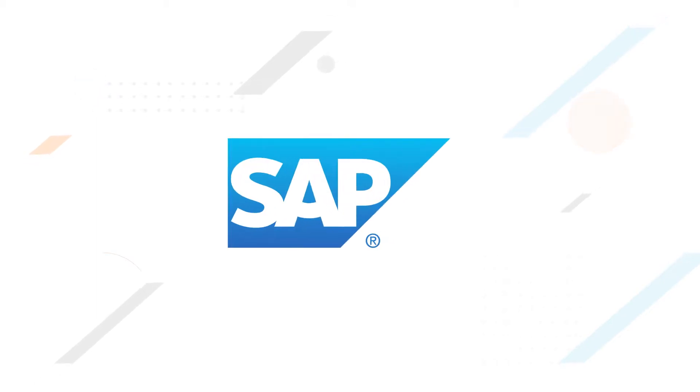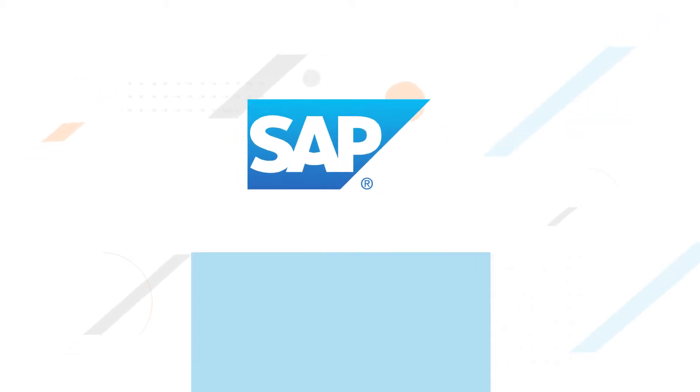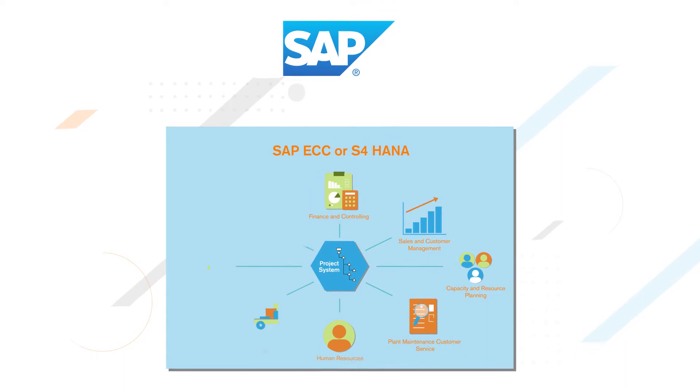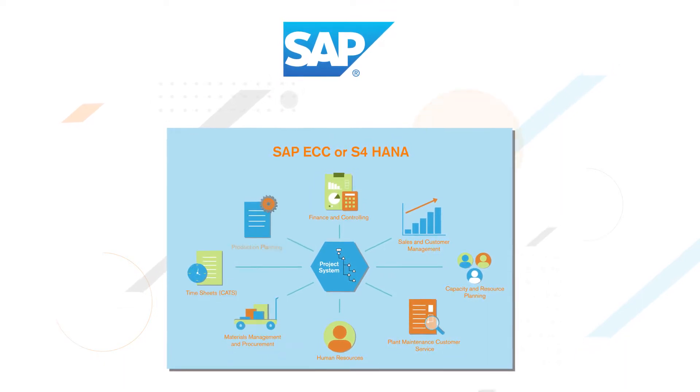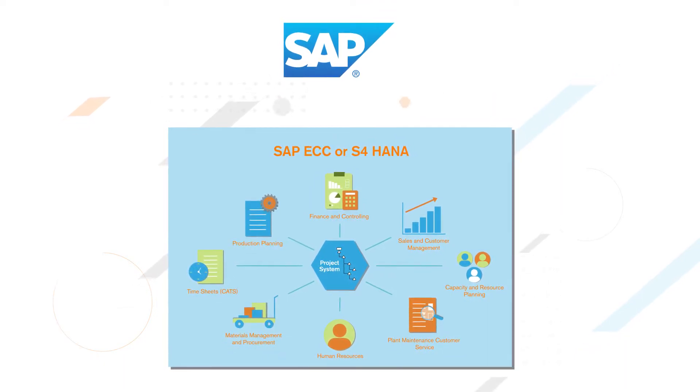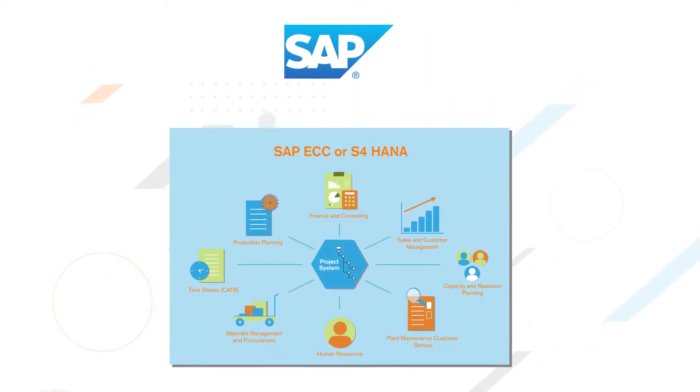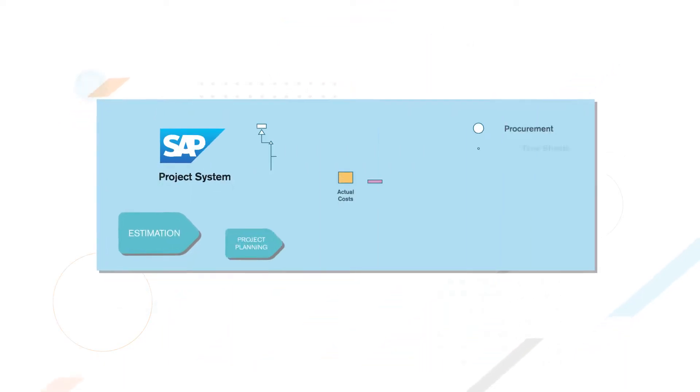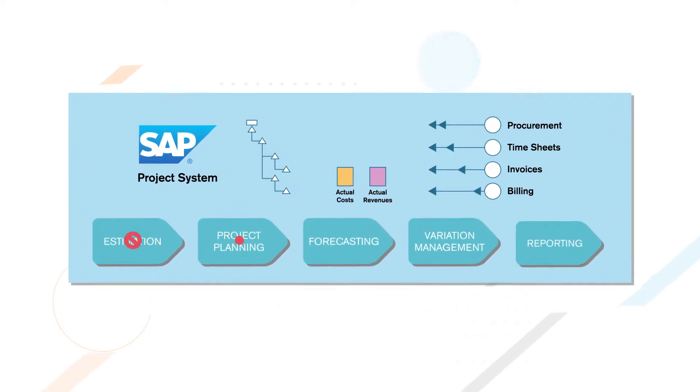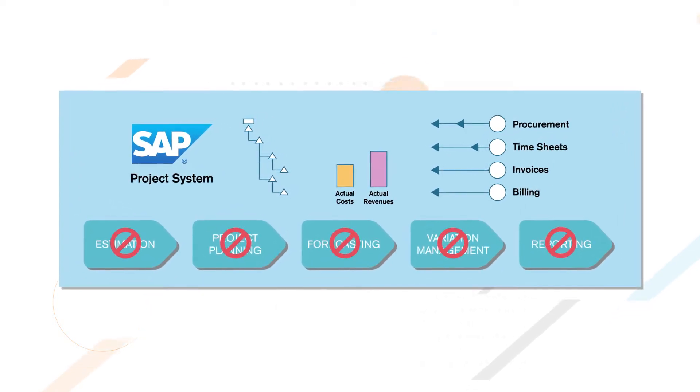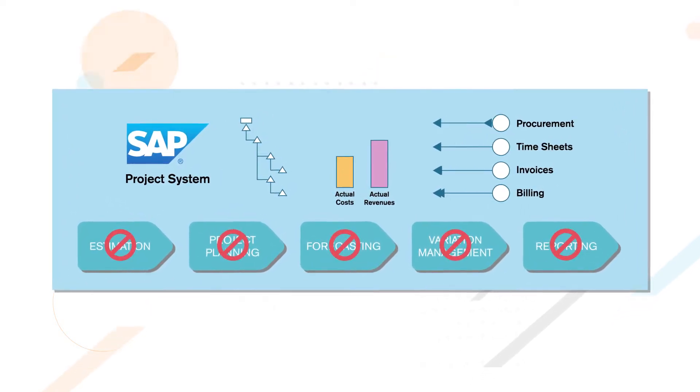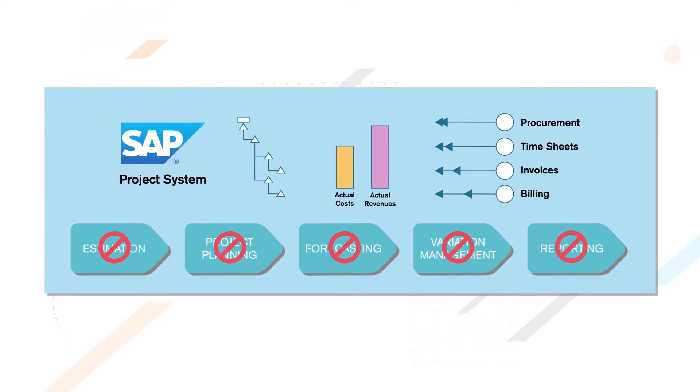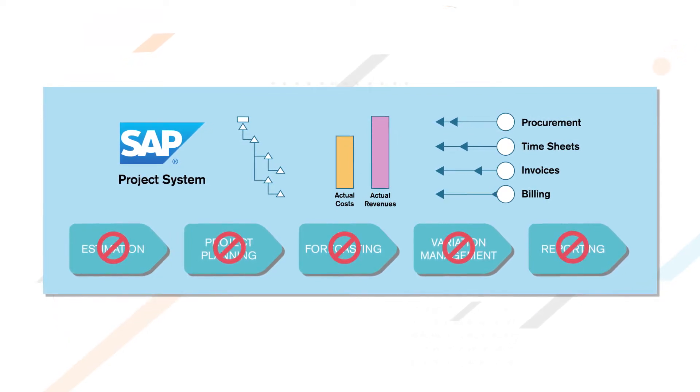Project System is the most integrated module in SAP as it connects many project management activities within a truly integrated SAP system. But due to its complexity and lack of important functionalities, Project System in standard SAP is usually only used to collect actual costs and revenues.